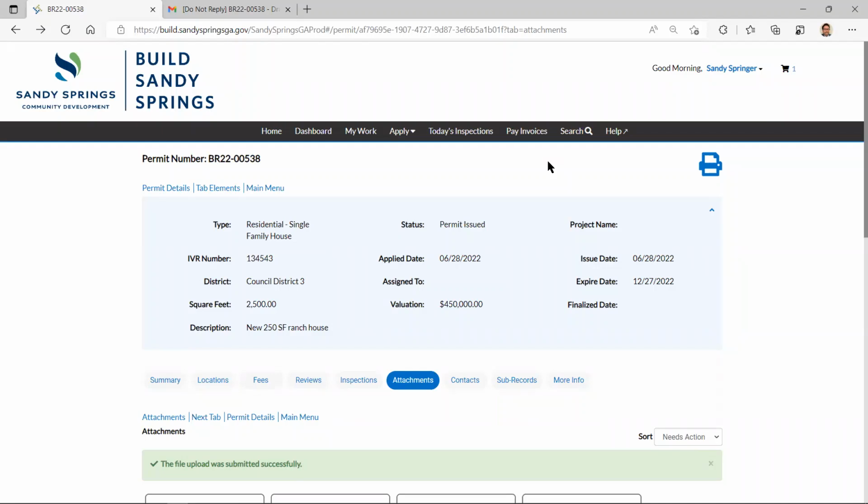A couple things that catch people in as-builts are HVAC. HVAC is not allowed to go into the setback. And quite often they'll move it from where it was approved on the plans, and then it'll be over the setback. That's when we discover it, because the setback is an imaginary line out in the field, right? We can't tell where that setback line is until we get a survey of it. And then that's when we know. So that's why we also require things like foundation form surveys for new construction, so that's our last chance before we go ahead and build this big structure. And then it gets complicated after that.